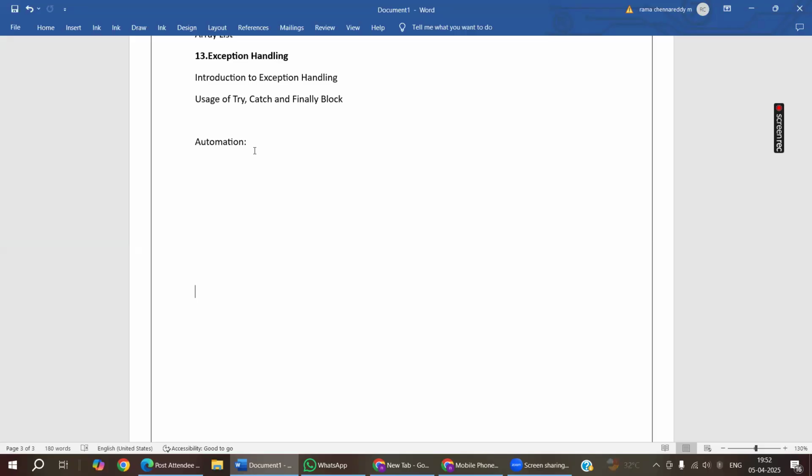Before entering into the test plan, first we have the project management plan, PMP. If the project management plan is approved, then only the test plan will be prepared. If the test plan is reviewed and approved, then test scenarios will be written. Then test scenarios should be reviewed and approved, then you can move to the test cases. Test cases should be reviewed and approved, then you can start the test execution. This is the process.